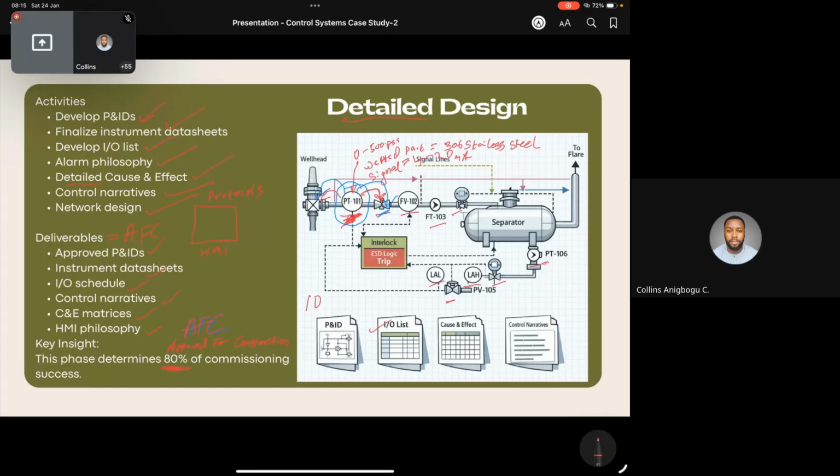I mean, before you arrive at this approval for construction, you will have created some of these documents that you are just purely issuing for comments. Right? You are just issuing it for comment. So you can generate as much as probably 4 or 5. You can do 4 or 5 iterations, if not more. And that's even when your team is very efficient.